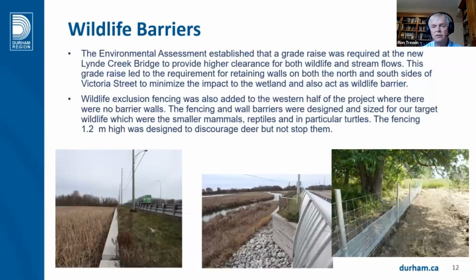Originally, our environmental assessment proposed armor stone walls. On the north side, we would have had to build out further into the marsh if we constructed armor stone walls so that we could found them on something, so we went with sheeting instead, which our consultants recommended. You can see in the picture on the left the cattails growing right up to the sheeting, and that's a capstone on top that we constructed later.